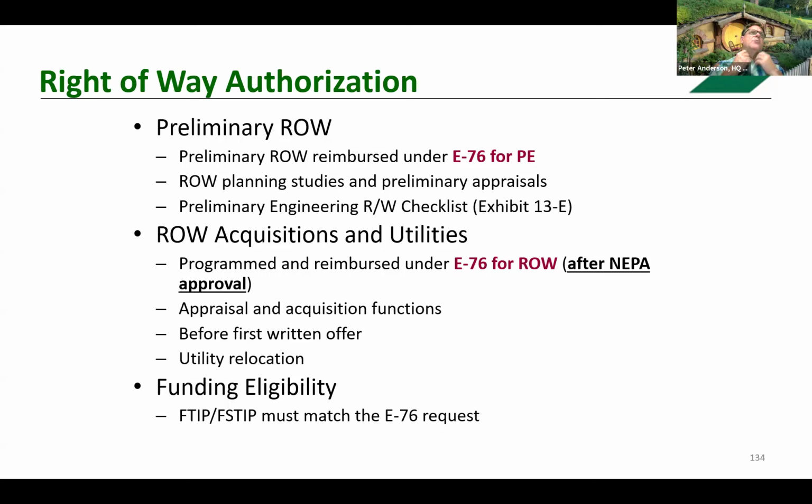One thing I didn't mention under NEPA, I'm going to step back, is that if there is $1 of federal funds anywhere on the project, NEPA will be required. So I kind of touched base, but I want to emphasize, even if federal funds are not used for environmental, NEPA will be required if federal funds are used for construction, for example.